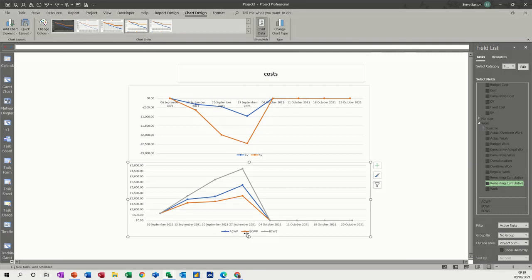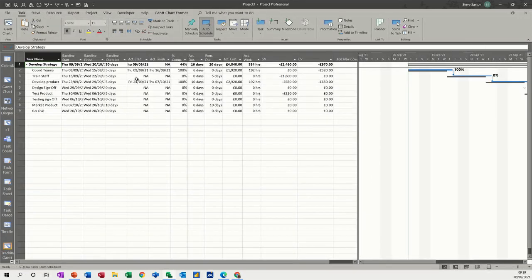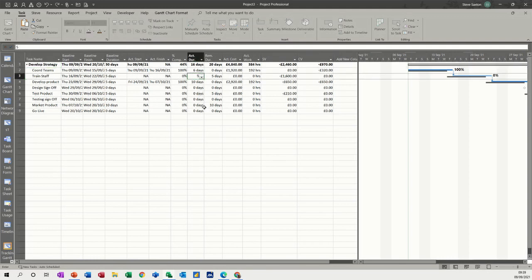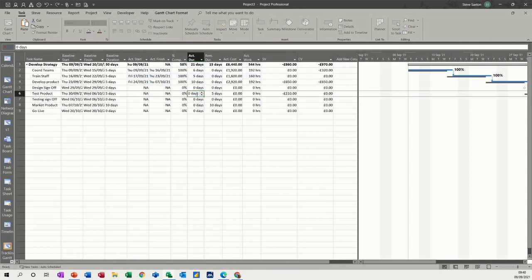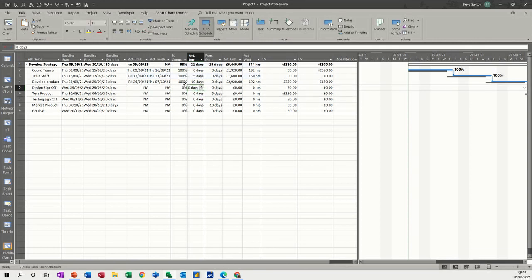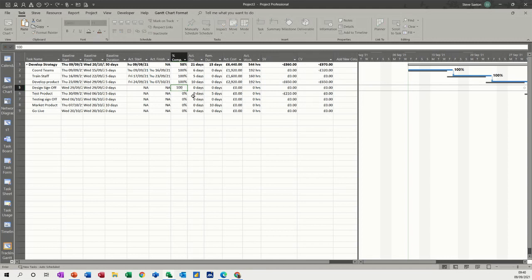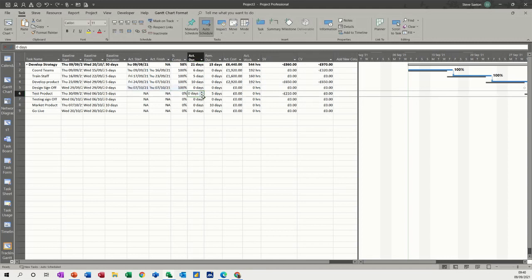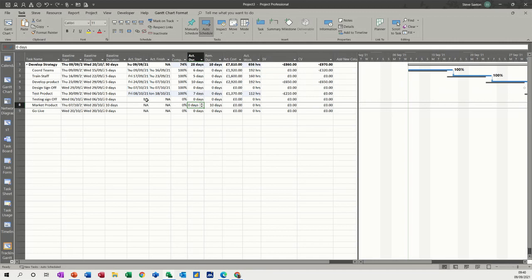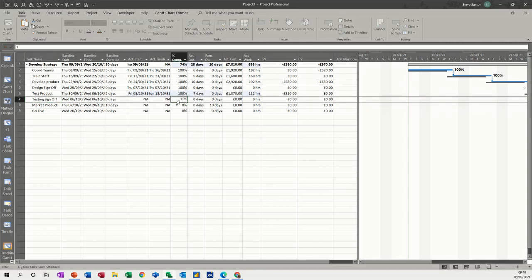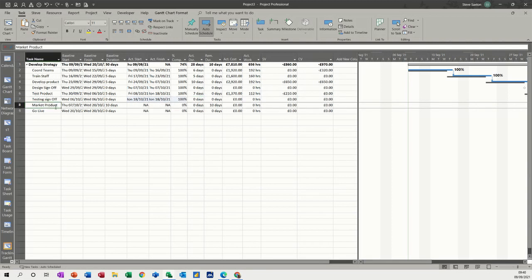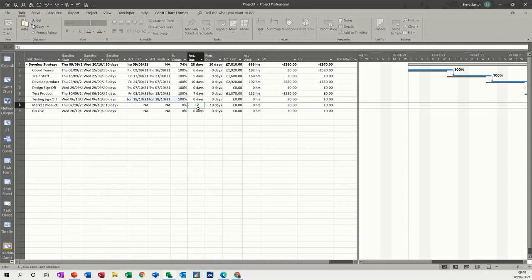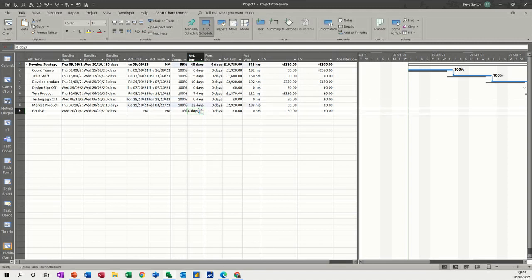If I go back to the tracking Gantt, as you're updating this project - I said that was five days. Actual duration is zero - that's just a milestone, so I'll put that 100% complete. That should be five days. Let's say that was seven days. That's just a milestone, so I'll do 100% complete. This is the way I normally update these sort of projects - I don't just type in 100% unless it's a milestone. Market product, let's say we needed to do an extra two days on this, so actual duration was 12.